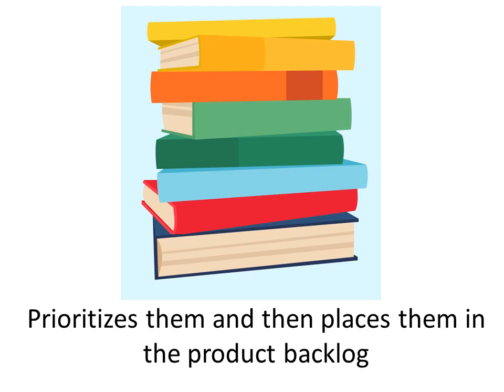One of the other key roles is to identify and prioritize the different user stories, the functions that would be released ahead of the others, and this is done according to the maximum value that can be generated for all responsible.